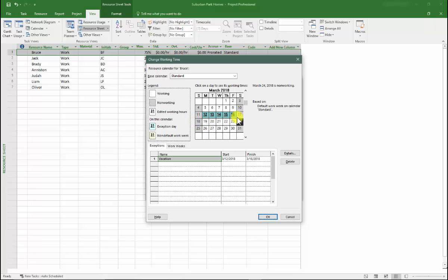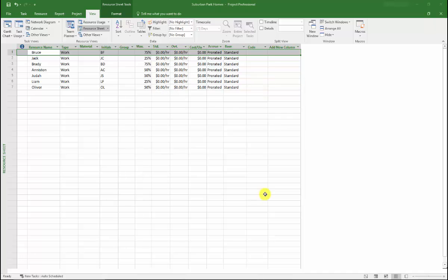And you can see that the times are here. Okay, so now after you've assigned non-working times to all your resources, you want to actually assign those resources to tasks on the project. And you can allocate any number of these resources to a task you want, and Project will automatically assign activity and resource information in the background to the project as you do that.